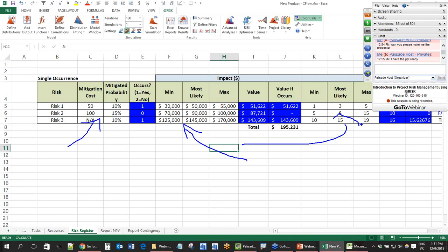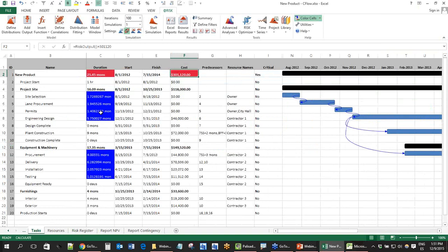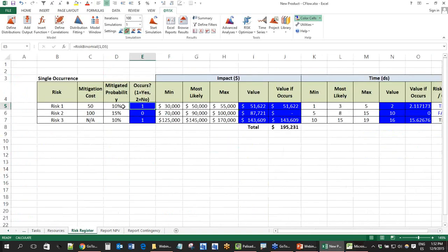That, for example, you have a greenfield investment in a very hostile country, and then you want to reflect the risks. So instead of adding durations that are really exaggerated, like from 1 to 12 months, you will add a task from 1 to 3 months, and you will add the risk here with a probability, let's say, of 20% that is going to take from 2 to 8 months, right? So this is what's really difficult, to make a risk register that is reflecting the conditions of your environment, right?